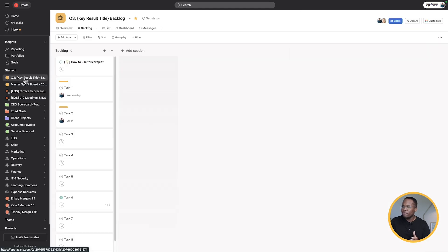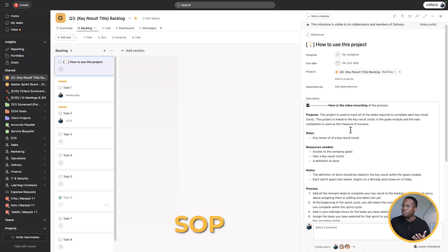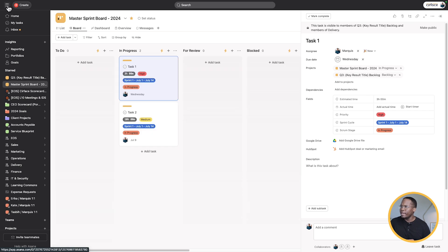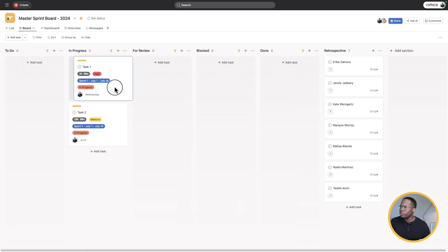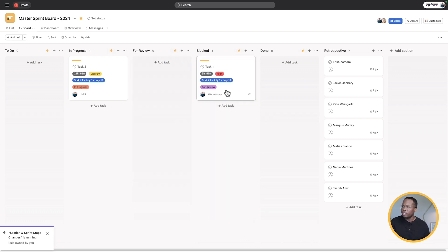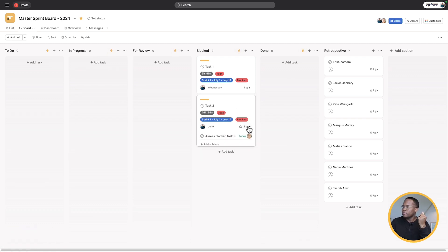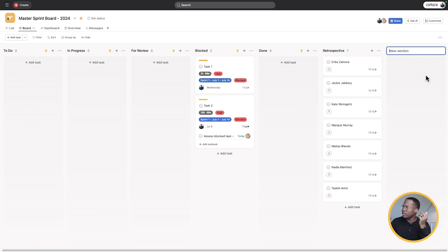Every team member will have their own version of this — this is just a template we're using. I've added in a little SOP on how to use this project with all the steps and resources so they feel well equipped. Each team member, based on the key results they're responsible for, will have their own project just like this with one simple section. Now let's go back to our master sprint board. When we move a task to the blocked section, it changes to blocked, adds a subtask, and it also changes priority from medium to high.